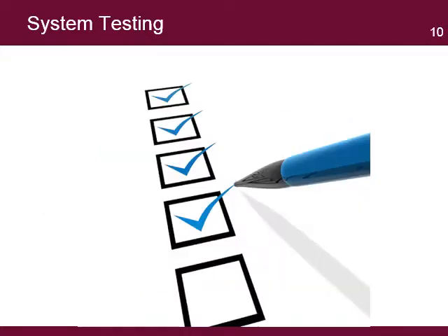Once the system is fully tested and all issues have been solved, the project manager will formally accept the delivery of the system. This is an important step as it shifts the responsibility of the system from the developer to the project manager.